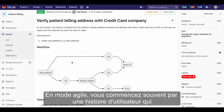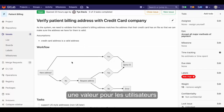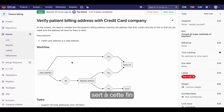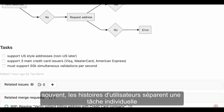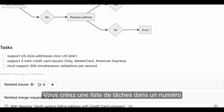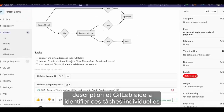In agile, you often start with a user story that captures a single feature that delivers business value for users. In GitLab, a single issue within a project serves its purpose. Often a user story is further separated into individual tasks; you could create a task list within an issue's description in GitLab to further identify those individual tasks.